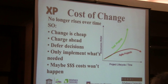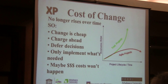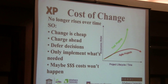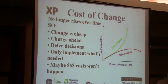In traditional projects, as they go further down, the risk goes up. But with agile projects, the risk leaps down as you go on because you have something behind you that works — you've tested it. The cost of change does not rise over time. With big cathedral projects, you can't change because it's too far in. But with XP, change is cheap. You can charge ahead and defer decisions.